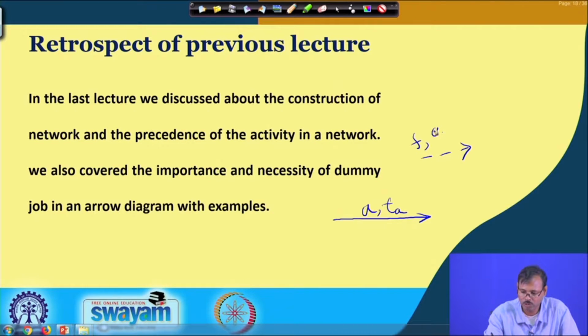and essentially those have 0 length and 0 costing. So, basically, 0 duration, 0 costing dummy pseudo jobs are added to show the precedence of the jobs for completing the network, which are not actually existing.